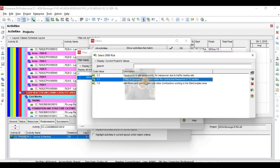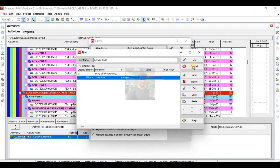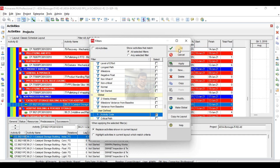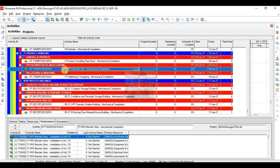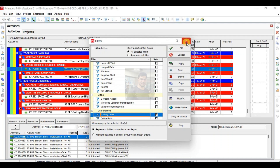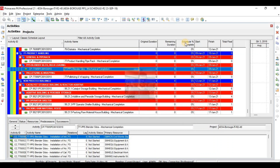Delay in completion of project within the contractual time period of 32 months — see what is included here. Product handling, pipe rack, mechanical completion — these are almost those activities which are on our critical path. So you can filter your activities according to your needs, or according to the need of the client or your management.